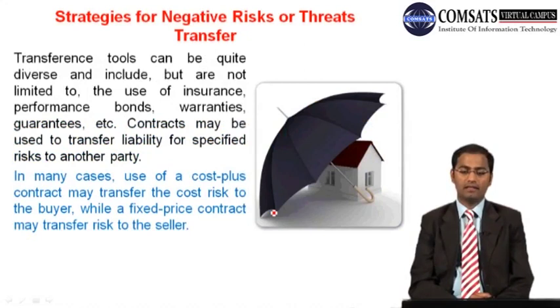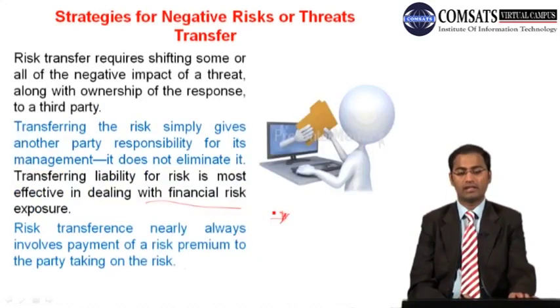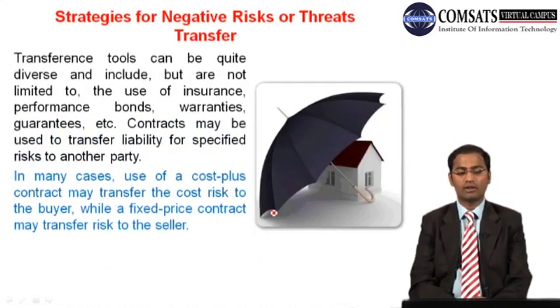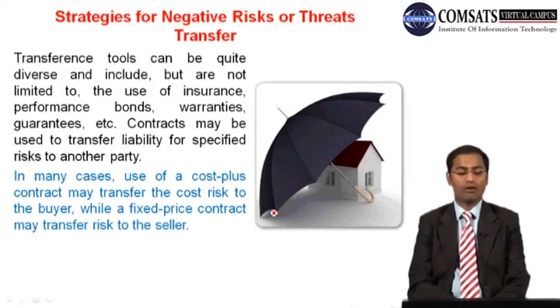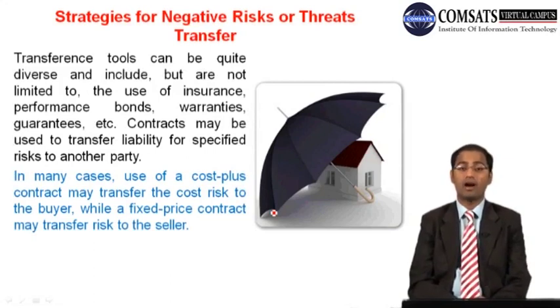Okay, and then there is another tool, and that is transfer, and still same. Transference tools can be quite diverse and include but are not limited to the use of insurance, performance bonds, warranties, guarantees, contracts may be used to transfer liability of specified risk to another party.